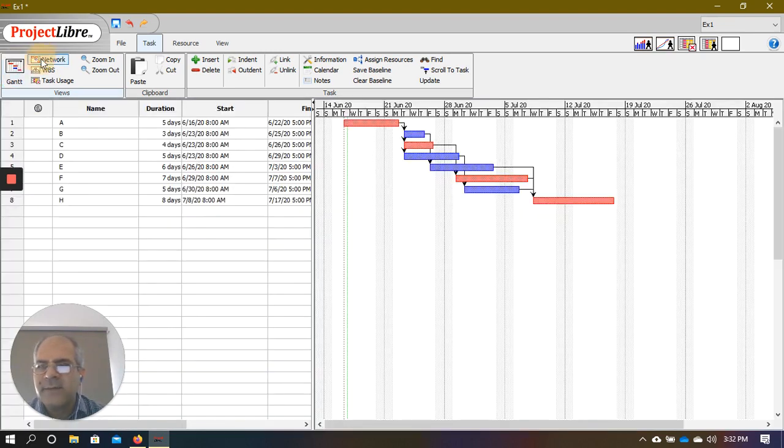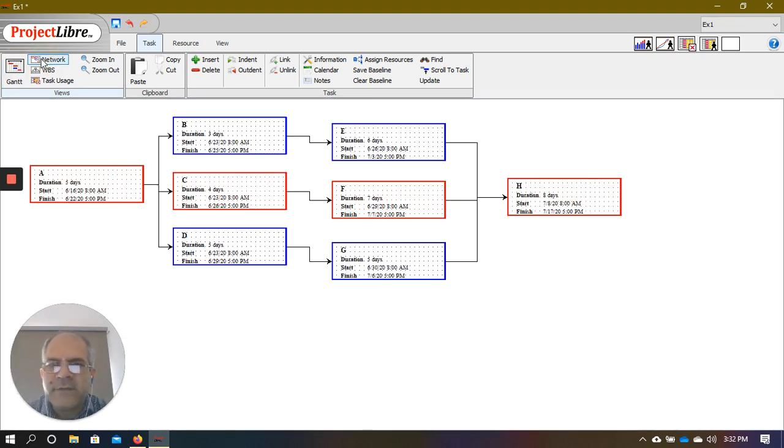So this network diagram looks a little bit different than the diagram that I had on that piece of paper, because these are two different methods that are possibly used. The problem is that the method that I did on the piece of paper is something that the softwares don't follow. The softwares follow a newer method, and what you're seeing here in front of you is that new method, which is called the activity on nodes, or the precedence diagramming method, right? So the ADM,